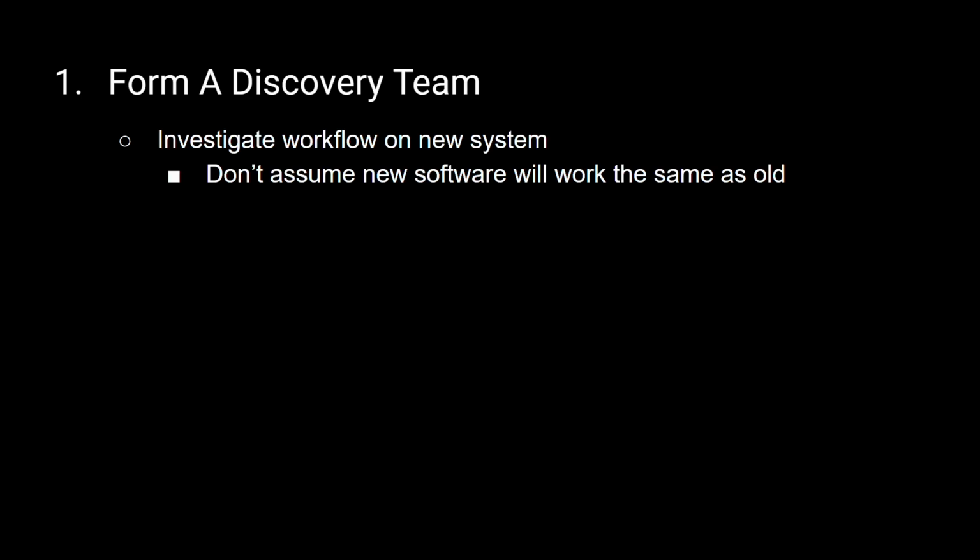Starting with the first lesson, form a discovery team. The purpose of the discovery team is to investigate the workflow on the new system and be able to compare it to your current system. Some people call this gap analysis. The important point is not to assume that the new software will work the same as your current software.